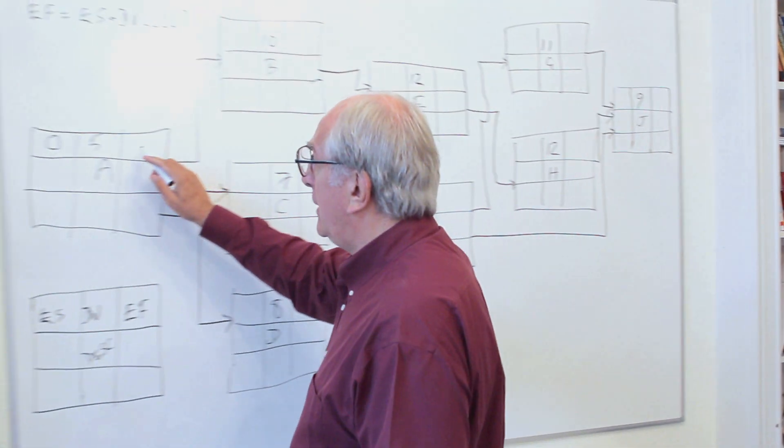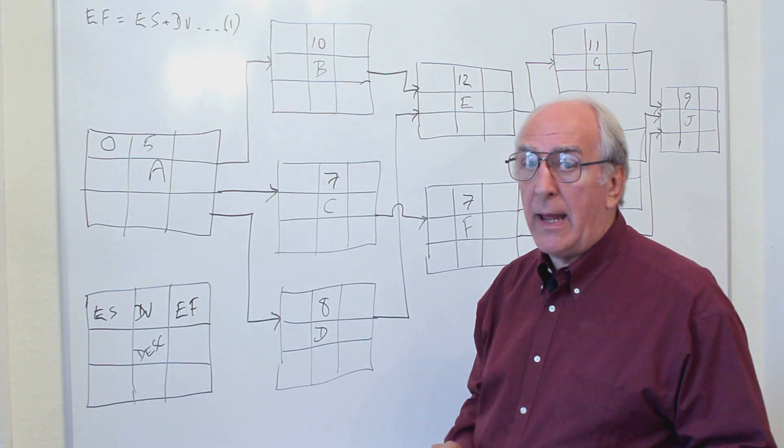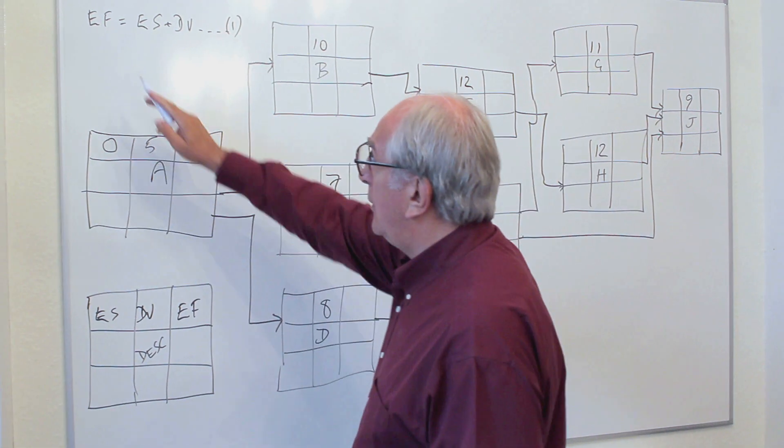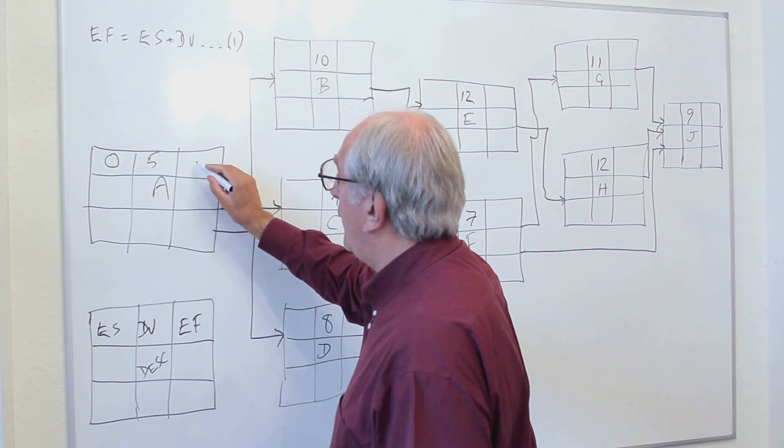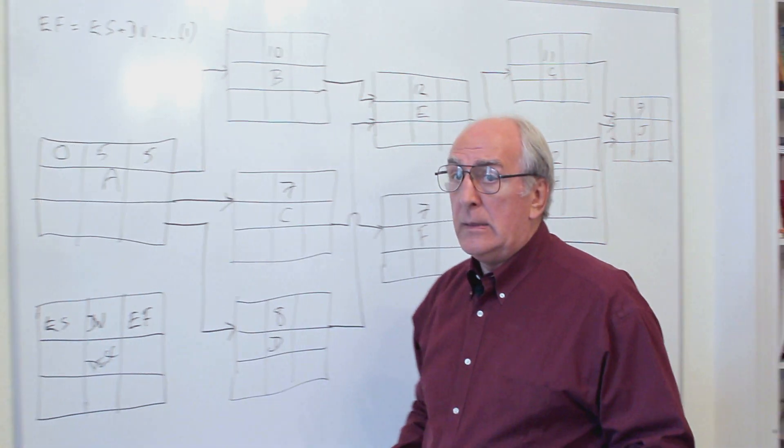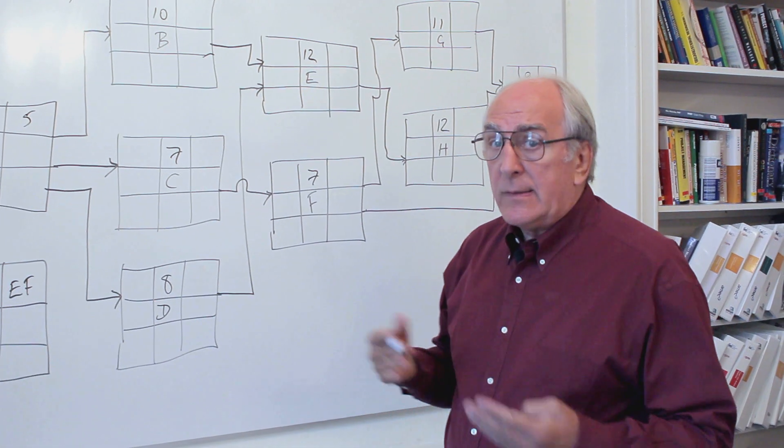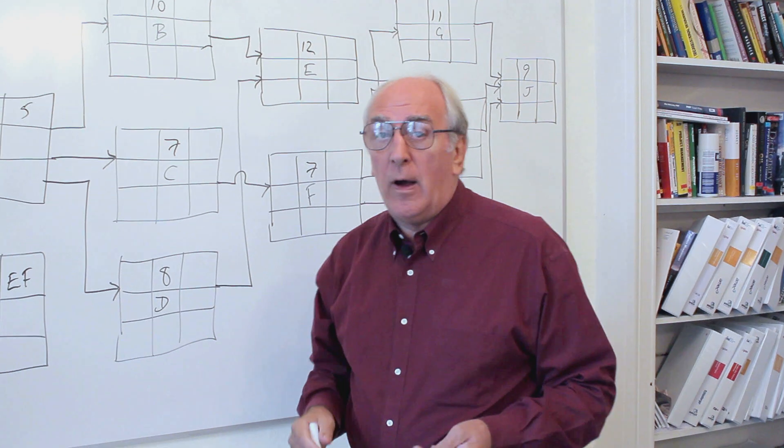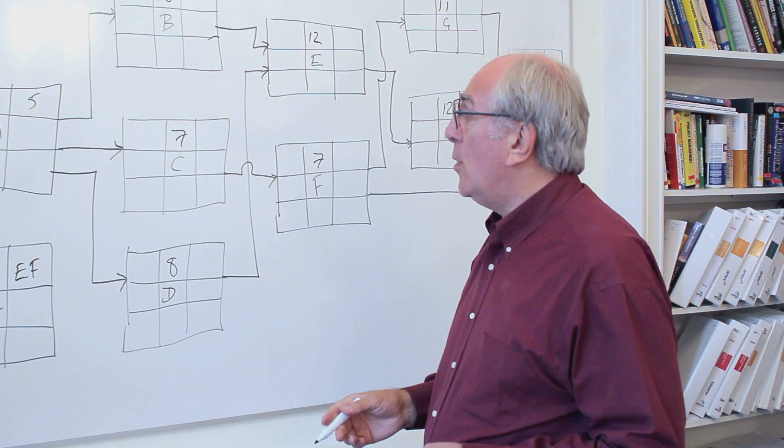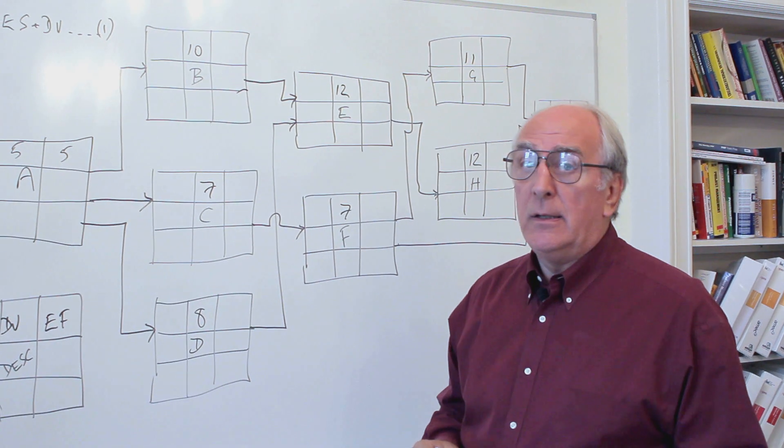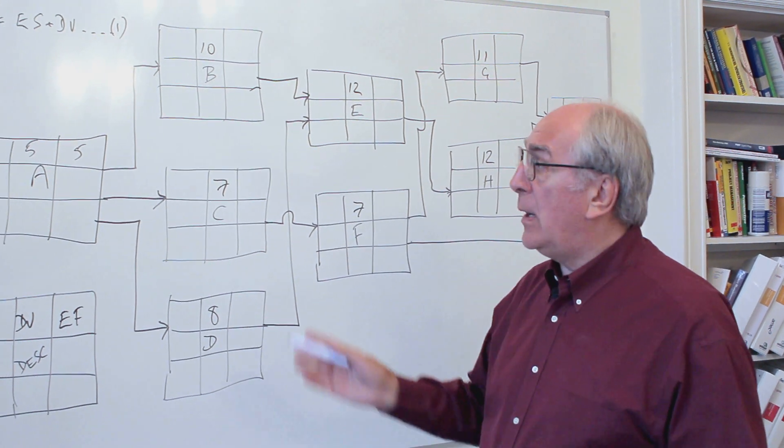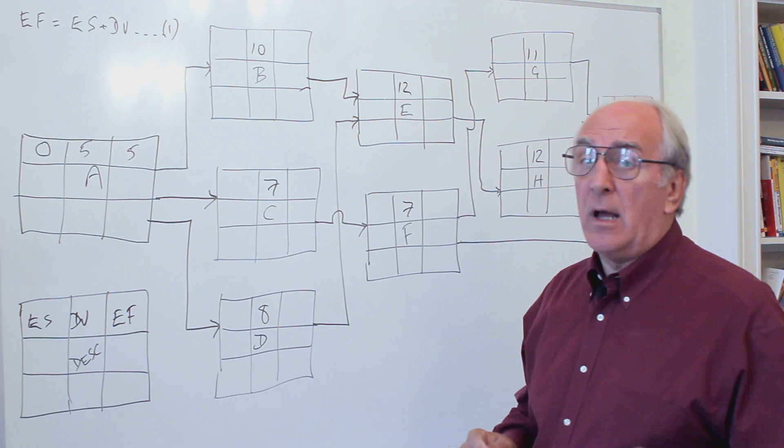The earliest finish of activity A is simply the early start plus the duration. Early start plus the duration: zero plus five is five. Now that's the end of period five.